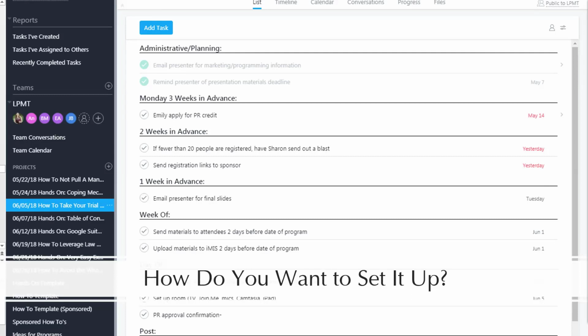And for a template where, say, for instance, you've got a probate and everything is based on timing, you could approach it like that. So you create this template and then you do the task list with the deadlines that are looking at backing out from a due date.